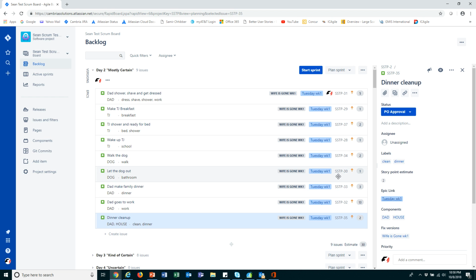So this is a little bit heavy for me. We've got a few too many stories in here, so we really need to thin it out a little bit. So the team can negotiate with the product owner and land on a number that is suitable for them. And right now, the Scrum Master is telling us our target really needs to be around 25. Maybe 27, 28,